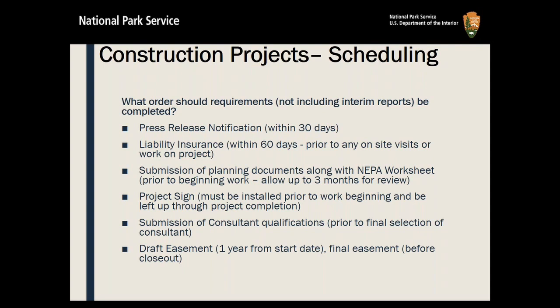Ginger talked about that. Liability insurance, we'd like to see within 60 days, certainly before any site visits or work on the project. Remember, this is a construction project, and it's a federal one at that. So you want to protect yourself from anyone walking on site. If the site is open to the public, if it's somewhat accessible, then you'll want to apply for some sort of security.